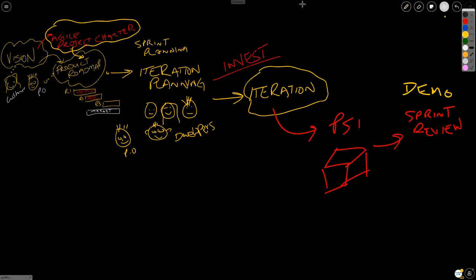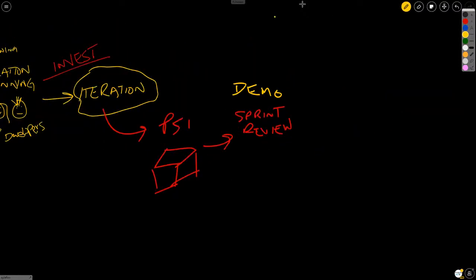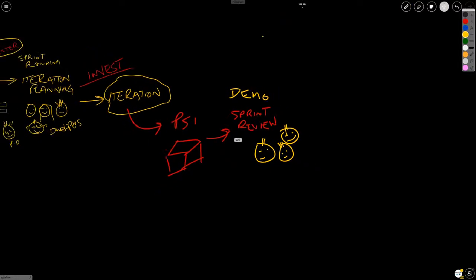The sprint review helps the customer understand what exactly you have done. So we got all these customers just observing, taking a look, giving their 2 cents as far as is this on the money or not. And the product owner knows who to invite for these demos or sprint reviews. The sprint reviews could also be instrumental in getting additional user stories that were not in the product backlog to start with.